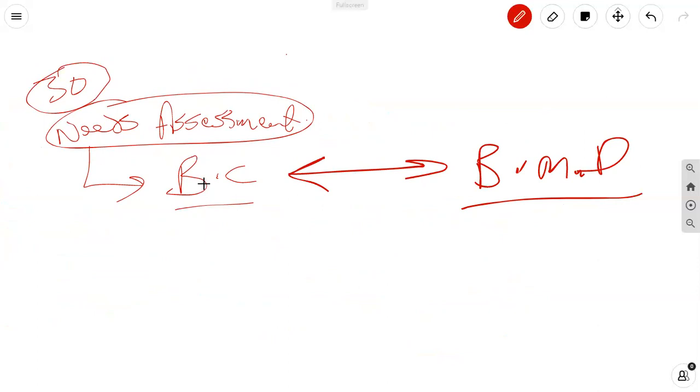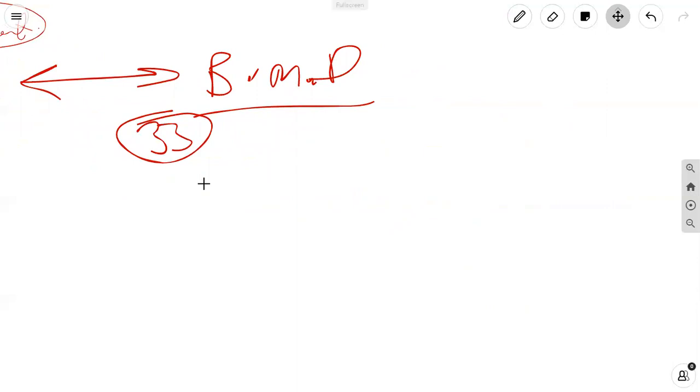The benefits management plan contains a lot of information documented on page 33. And I will just give you the top of the waves. I will give you abbreviations for simplicity. So page 33 in the PMBOK guide mentions these key things. You may or may not have taken note of them, but these are the classic building blocks of the benefits management plan. Before embarking on the project, you should ask yourself, what are we really seeking to gain? Target benefits. What are you targeting by way of benefits? What is the expected tangible and intangible value to be gained?